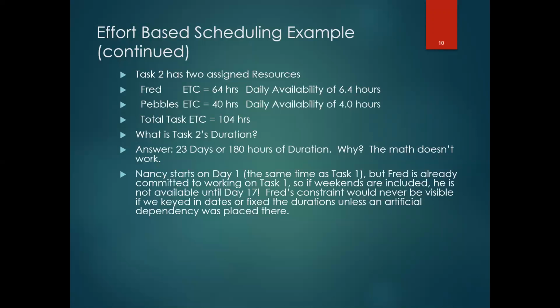So Fred's constraint would never be visible if we keyed in dates or fixed durations unless an artificial dependency was placed there. That is, I could have made task 2 of higher priority either with a dependency or using the workbench, the priority capability.